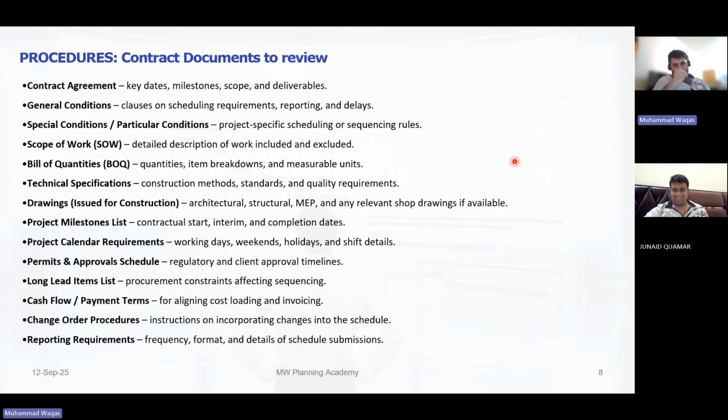The other activity is curing of the concrete. You can use a 7-day calendar for this activity because as concrete has to cure, it doesn't need a holiday or something like that. So there are a couple of examples where you can use it.